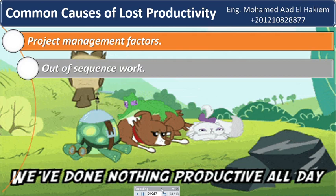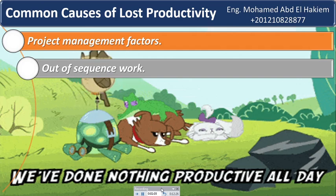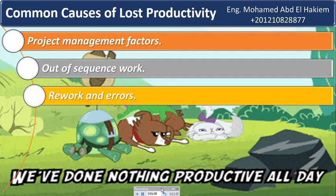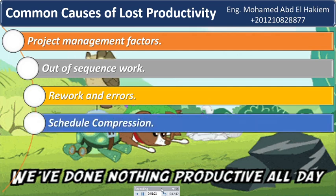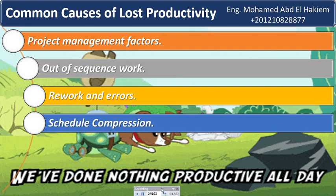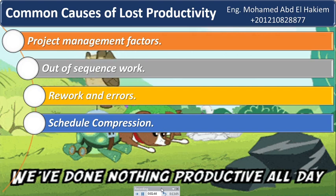Twenty: out-of-sequence work. When work does not proceed in a logical sequence, productivity is likely to be negatively impacted as crews are moved around the site haphazardly. Twenty-one: rework and errors. When work in the field must be done more than once in order to get it right, productivity may suffer. Twenty-two: schedule compression. It may result in overmanning because shortening the overall duration requires completing the total remaining work faster. Schedule compression, when associated with overmanning, often results in significant productivity losses due to dilution of supervision, shortages of materials, tools or equipment, increased difficulty in planning and coordinating work, and shortages of skilled labor.